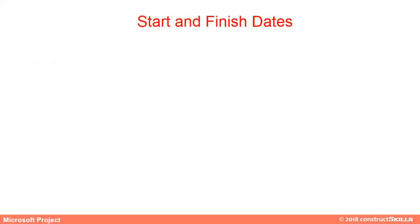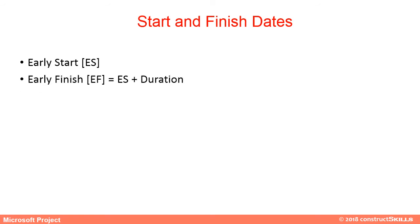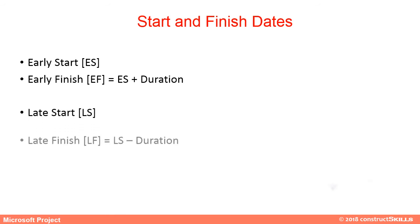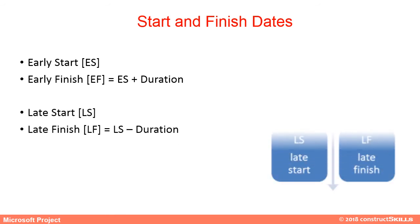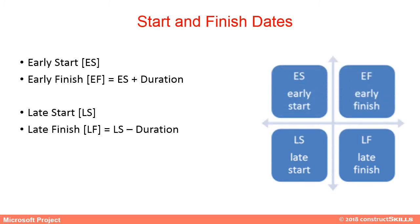Start and finish dates: Early Start is termed ES. Early Finish (EF) equals ES plus duration. Late Start is called LS. Late Finish (LF) equals LS minus duration.